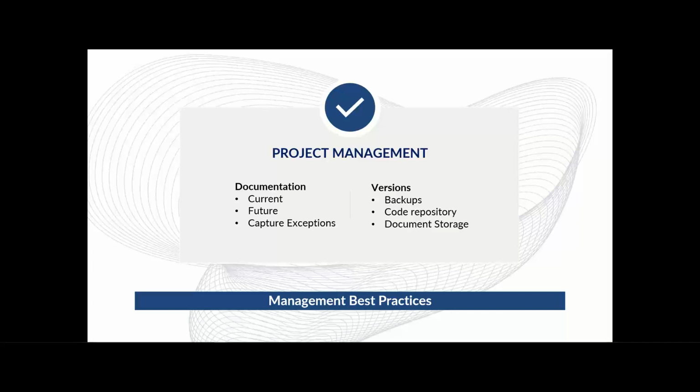Documentation doesn't stop at the architecture process or planning phase of the implementation. It's important to clearly define the test cases. Whatever you devise as your requirements, whatever you devise as your goals, need to turn into test cases, need to turn into standard operating procedures.